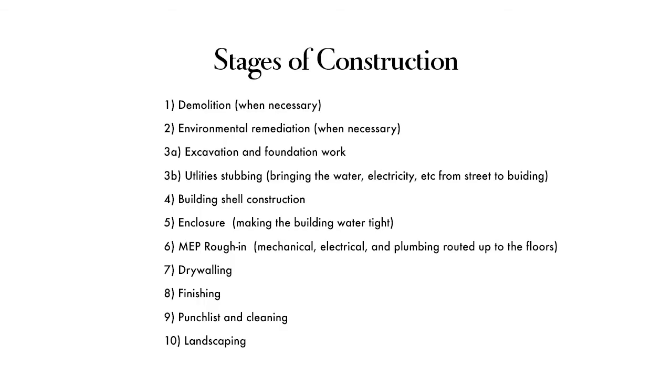Generally speaking, yeah, you're going to start with your demo, wipe the site clean and get a fresh start, and then you're going to go down with, if you have underground parking, that's going to have to happen before you start going up. So you often clean it down, and then you get down to the ground, and then you're working just to get back. Exactly. You're going down. You're pumping out water. You're doing whatever you need to do to start that foundation coming up.